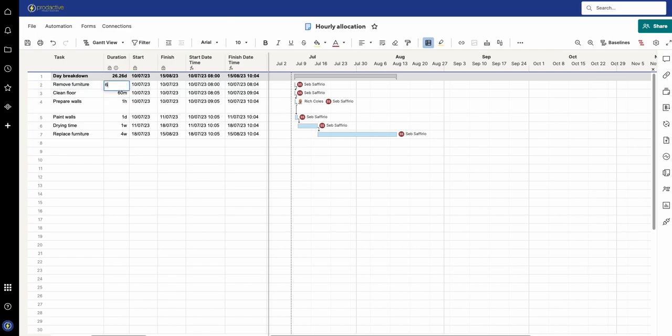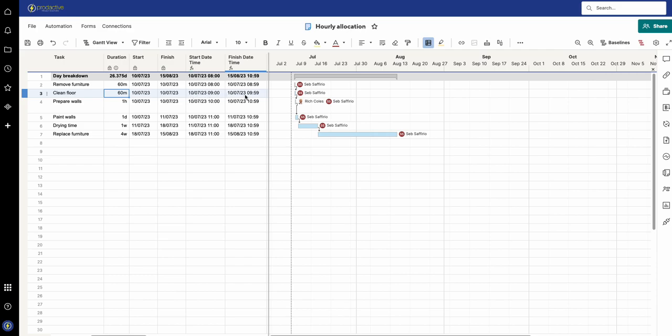If I now change this to be 60 minutes, therefore 8 to 8:59, and the next task is one hour as well or 60 minutes, that's 9 to 9:59, and then the next one is one hour and that's 10 to 10:59.